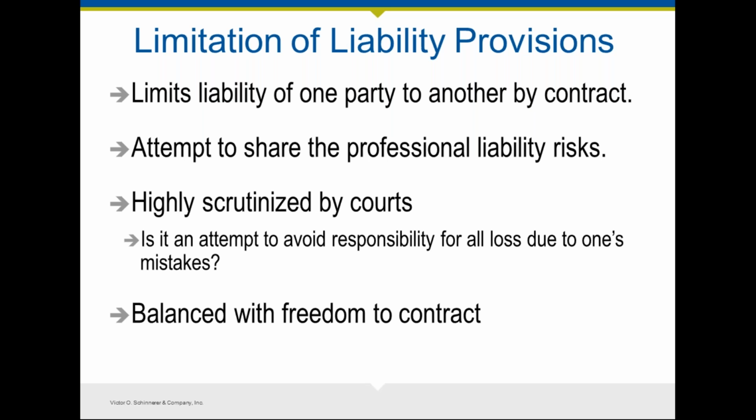When these types of provisions are litigated, they're highly scrutinized by courts, generally speaking, because it does imply that the design professional is attempting to avoid responsibility due to their own mistakes or their own negligence. And from a public policy standpoint, the courts would look at whether that offends traditional notions that a party should indeed be responsible for their actions, especially a design professional who has been tasked with protecting public health, safety, and welfare. So there is that concern about enforceability.